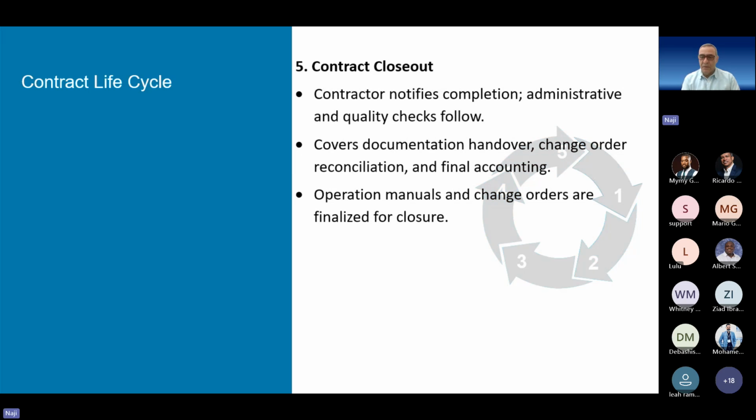The final one, contract closeout. Here I would like to pause for a while and comment on this issue. At least in my country, working for more than 35 years in construction, closing is not properly done. The project is over, so we presume no more work to do. We get paid or we pay the contractor and that's it. In the eyes of PMI, it's a wrong procedure.